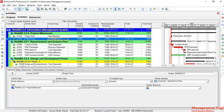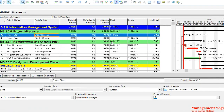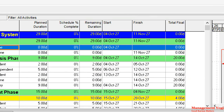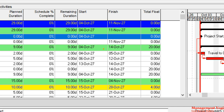We also have milestone activity types: start milestone and finish milestone. A milestone is a significant point or event in the project plan. When you have a start milestone, only the start date will get populated. For a finish milestone, only the finish date is populated — for example, the finish milestone shows the 11th of November.